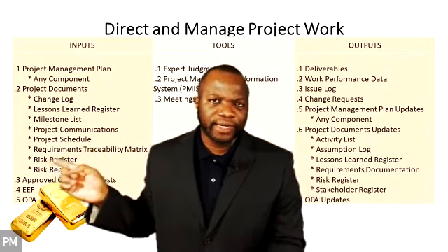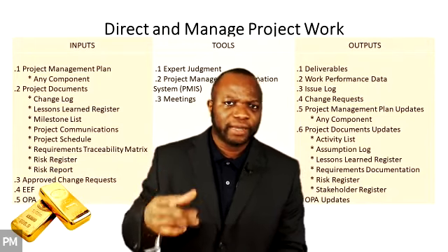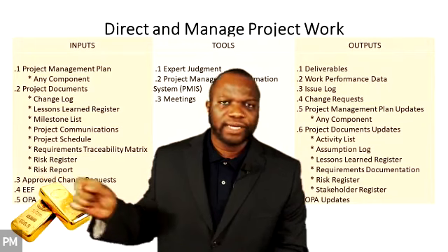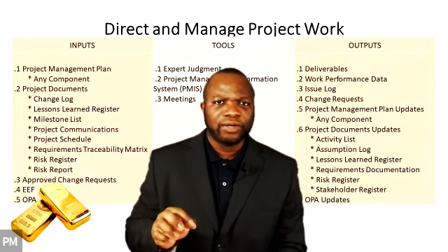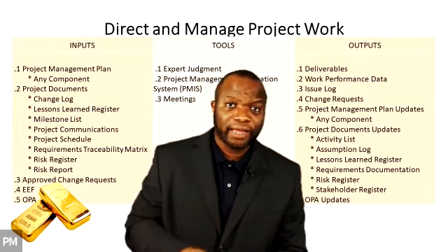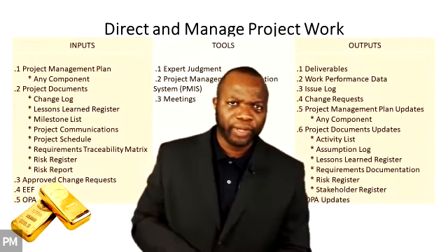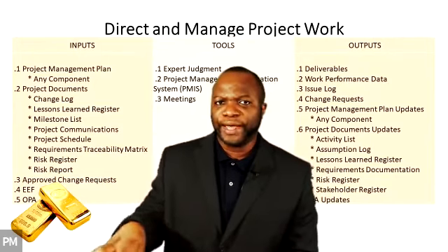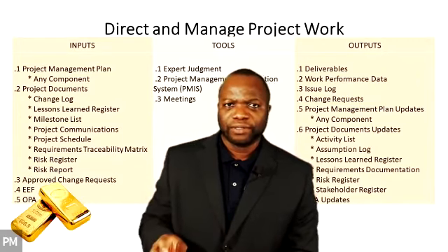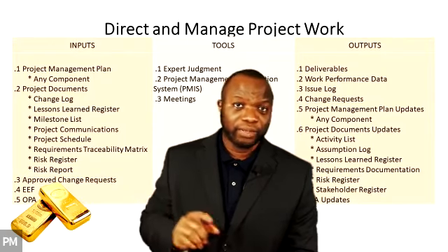Risk register is a register of risks, those uncertainties that can impact the project positively or negatively. Risk report is a report highlighting the latest and greatest, biggest of the biggest risks that can impact the project, the most important ones for a particular time period. Your risk report could change over time, but we want to highlight those risks that should be on the radar. Management may be able to help you out with that.